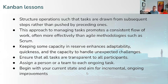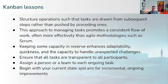Kanban also allows us to assign owners to things — a person or a team — so that in a SAFe environment, for example, someone is clearly responsible for product or portfolio-level kanbans. If everybody's responsible, really nobody is. Having visible ownership means when people have questions, they can see on the kanban board who's responsible for a feature or batch. And remember: kanban is not intended to fix everything overnight or be a big-bang transformation. It's a continuous improvement process — start where you are, find and elevate just one constraint, make one increment of improvement, then go from there and repeat.